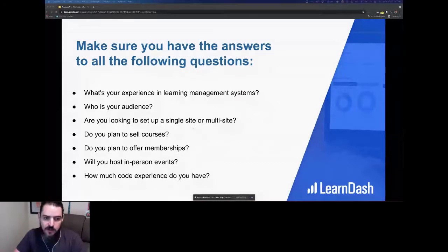And how is your user planning on selling their courses? Meaning, like we talked about a couple of times, directly through the LMS, through a membership site. Are they planning on selling it through e-commerce? And all that adds on. And I think one of these questions can easily add a day's worth of time to your budgeting as you're planning and building anything for your customers.